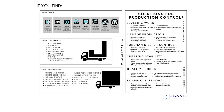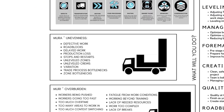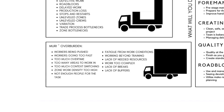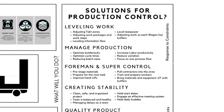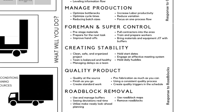On this sheet, we're always looking for waste, unevenness, and overburden. Each of these is bulleted out so you can specifically see if your crews are riddled with waste, interrupted by unevenness, or if the crew is overburdened. If you find that, over here to the right you'll see solutions for production control — leveling your work, managing production, implementing foreman and superintendent control, creating stability, installing a quality product, and removing roadblocks out ahead.